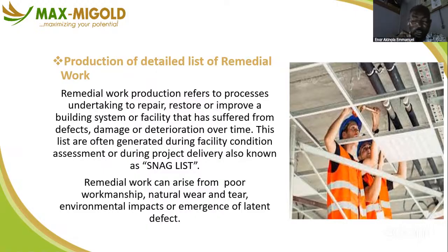It is only when that project is signed off that the finance department has the right to release the final payment to the contractor. And all the itemized issues during that visit are referred to as the snag list. Until the contractor ensures that he completes those itemized items, he cannot get his balance payment.